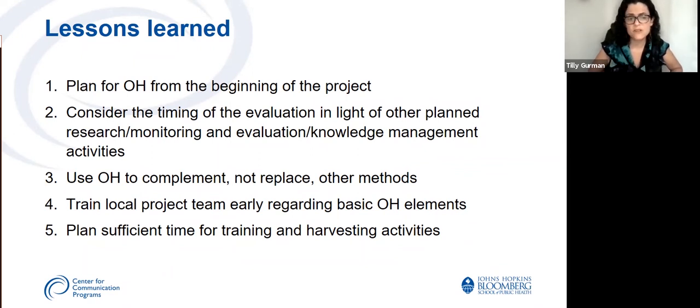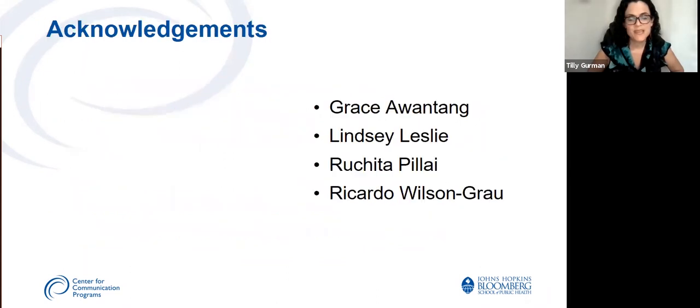And then our last lesson learned was really to plan sufficient time. It was more labor intensive than any of us really had envisioned. And in the Ethiopia project, Ricardo Wilson came with us on the ground to advise and work with us. And even having that expertise on the ground, it was still an incredible amount of effort and time.